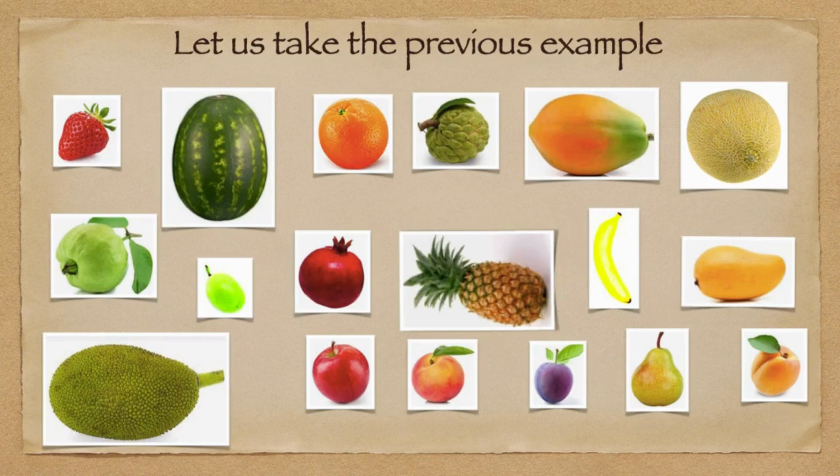First thing, we need to have a reference, a smaller one, based on the complexity, uncertainty and volume of work, and give the size. For example, in this case, let's say we take banana. Complexity wise, it's not complex as long as it is a ripe banana. If it is a raw banana, a little more complex. So the product owner should help you understand the nature of the fruit. For example, the banana is a ripe banana.